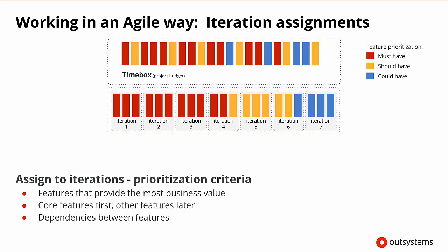So even at this stage in the project, we can perform a simple health check or sanity check. A basic rule of thumb tells us that must-haves should correspond to roughly 60% of our effort, should-haves another 20%, and could-haves another 20%. This way, there's a low risk of having to move important features out of the current release. When must-haves are higher than 60% of all the features, it indicates the need to discuss and review the reason for these priorities. Because if everything is important, then nothing's really important.